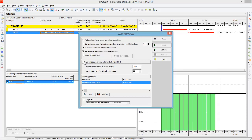What I normally do is use the option to level resources only within activity float. When you work with a big project, many activities will have float. If the program pushes an activity that has float, it's acceptable because it won't affect the total project duration. There is also an option to preserve minimum float when leveling — for example, you can set 5 days to preserve. Another option is maximum percent to over-allocate resources, set at 25% by default, which you can adjust to 50, 10, or 5 as needed. These are quite useful options in Primavera.